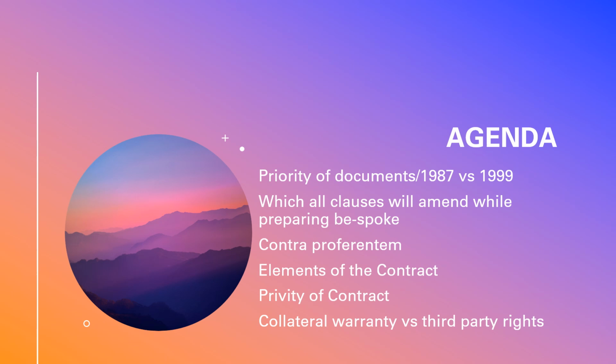That's the common word the employer will use: being an experienced contractor, you should be able to foresee those and tell us. Contractually, they will use this to block you. But when you go to legal, or to litigation, they will see this mistake in another way. They will ask who drafted this contract, who prepared the specification? Then it is the employer, and he is responsible.